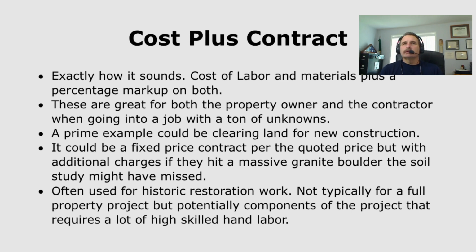Cost plus contracts do have some disadvantages. It doesn't necessarily motivate the contractor to keep costs under control. It also doesn't motivate the contractor to be very precise in their cost estimations and cost planning on the front end of things. It can, and there again, it just depends on the contractor. It can be a lazy way to get through things, but it's appropriate in certain situations.